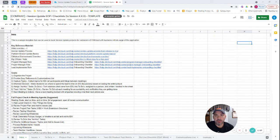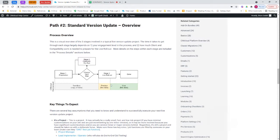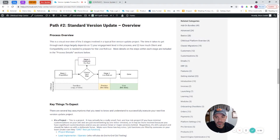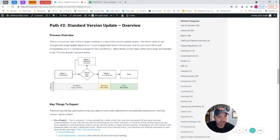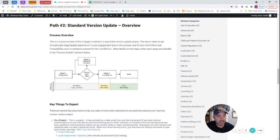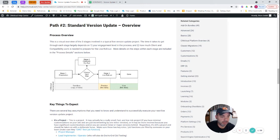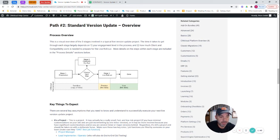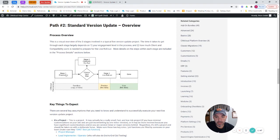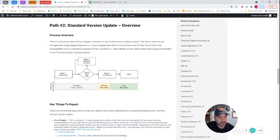The general concept of the version update process is there's stage one, which is preparation, which involves cutting a sandbox site and a sandbox database in SimCloud, applying the version update, the standard core product version update to that, and then running through a battery of testing to make sure that all of your customizations or any of your configurations are all compatible and you're not introducing breaking changes. The core team does do breaking changes, particularly on major version updates, so your customizations may not be compatible. They're not testing those customizations. So the preparation stage is doing things in a sandbox, and ultimately there's an artifact that you're going to create, which is what we call a go-live checklist.